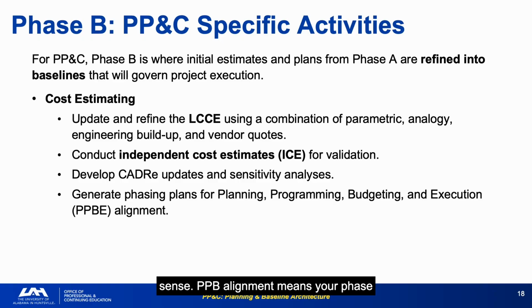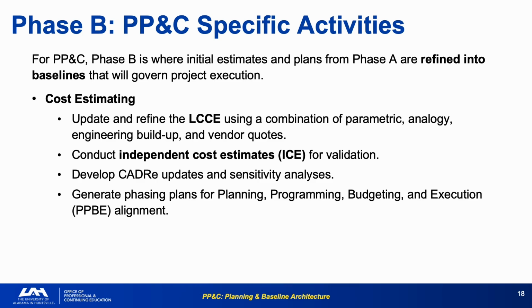PPBE alignment means your Phase B cost estimate cannot be merely technically correct. It must align with how funds actually flow through the government budget process. Phase, fiscal year, and appropriation category all matter.